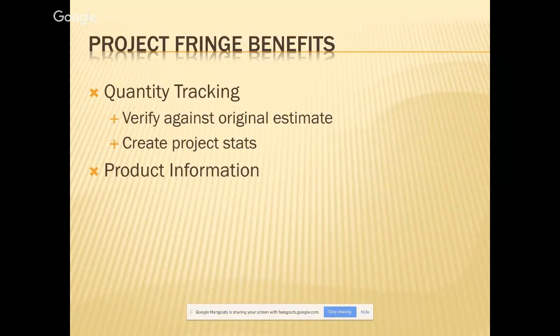The list of products, knowing what products you buy and what price you pay for them, and being able to export that was huge. We've set up monthly review meetings to make sure that our pricing is in line, and now we have trends and we can watch where our pricing is going. So for example, I can graph how our price of lumber has changed over the last year, how our price of concrete has changed. And we can watch that so that I'm really well informed when I go to sit down with the supplier and have a chat with them about next year's pricing.